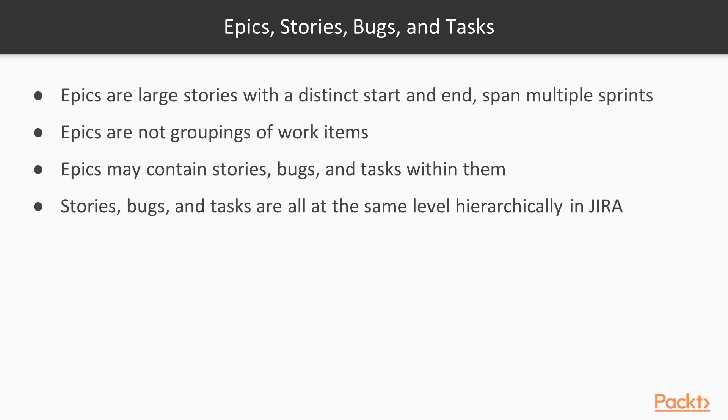Stories are smaller than an epic. Stories, bugs, and tasks are all the same level hierarchically. So they're all something that could be prioritized against one another within your backlog.